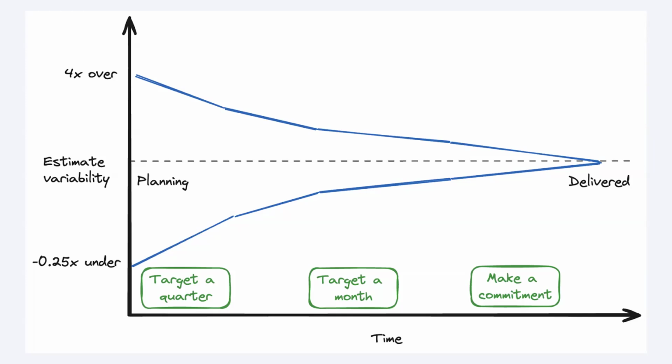What I like to think about with dates, with this sort of thing, is that when you are making estimates at this level, you have to turn it around and say, well, no, we're not going to estimate, but how about we agree when we would like this to happen? When will we like this feature to be delivered? When will we like this bit of re-architecture to be finished? When will we like this website to be ready for this campaign or whatever it is? And so that becomes a target rather than a delivery estimate.